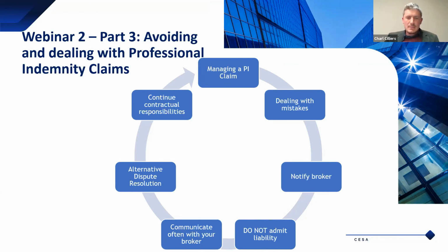One item to keep in mind is that it's always better to consider an alternative dispute resolution rather than going into litigation. See if settlement or mediation, such as adjudication or arbitration, would be possible before taking the route of going to court. And lastly, just because a claim is being instituted against you does not mean that you do not have to meet the rest of your contractual responsibilities. So let the claim process run out, let your broker be involved, and continue your work as the consultant in the project.